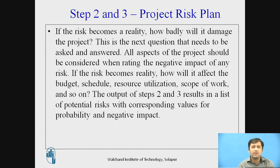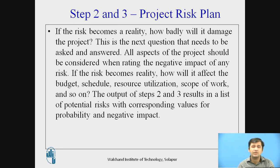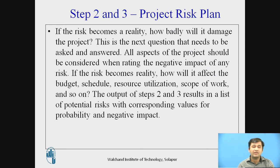Any number of questions should be asked: Impact on budget — whether budgets are going to overrun what we have planned, and if yes, by how much? What about the schedule — whether scheduling is getting delayed? Many times both budget and schedule are overrun. Resource utilization, scope — whether it is within scope or going outside. The output of Step 2 and 3 results in all potential risks with corresponding values for probability and negative impact. Risk means we are now talking of negative impact only.